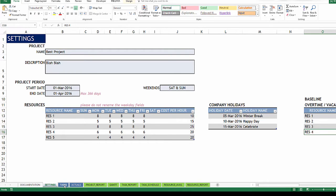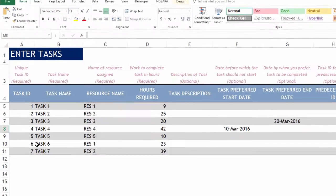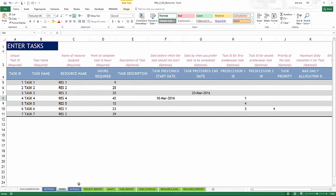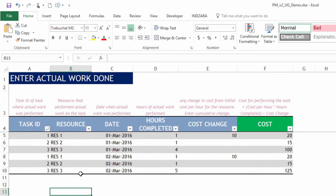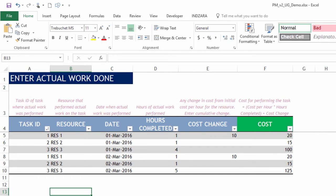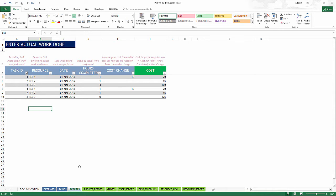The task sheet is where we will enter the list of our tasks. We can support up to 150 tasks. And each task has some required information and some optional information. This is where we would enter that. Actual sheet is the last of the data entry sheets. This is where we track the actual work that is performed on the project. Who performed, how many hours of work, on what task and on what date. All of this is entered in this one little table. And these are the three sheets of data entry by the user. All these other sheets, which are tabs are in green color. They are all calculated, fully ready to go for you. And they're also very interactive. So the data input is very minimal compared to the amount of automatic reports.